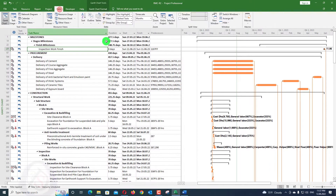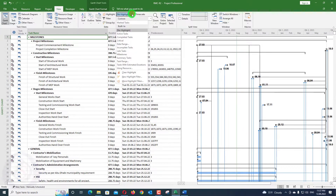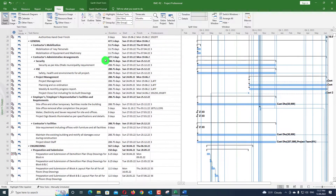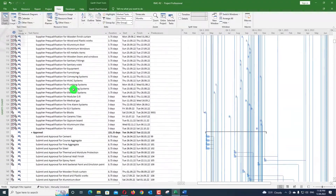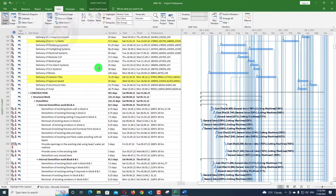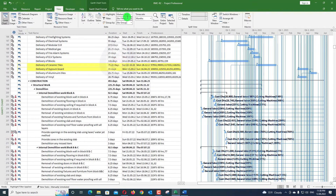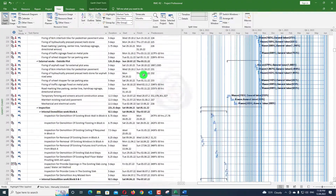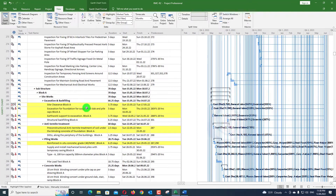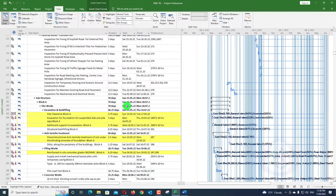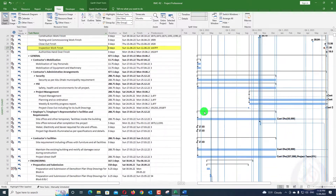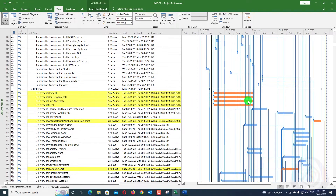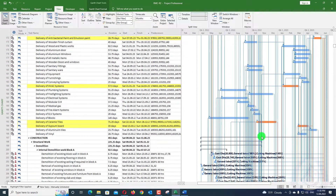There is another function: instead of filtering, you can use 'Highlight.' Remove the current filter first by going to 'No Filter,' then go to Highlight > Marked Tasks. All driving predecessor activities will be highlighted in yellow within the full task list, so you can still see all other activities as well. These highlighted activities are the driving predecessors — you can see them shown in orange on the Gantt bars and highlighted in the rows.